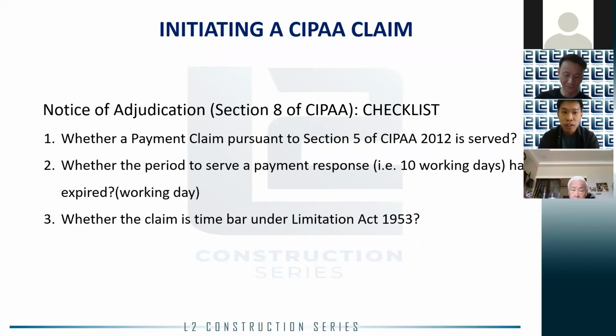Second, whether the 10 working days for the respondent to serve a payment response has expired. Bear in mind the calculation of working days depends on the location of the project site. If the project is located, say, in Johor or Kedah, Sunday is then a working day. If the notice of adjudication is served early, the entire CIPAA claim will be rendered premature. Third, pursuant to Section 7(3) of CIPAA, a dispute referred to adjudication is subject to the Limitation Act. So you must also check whether the claim is time-bound or not.